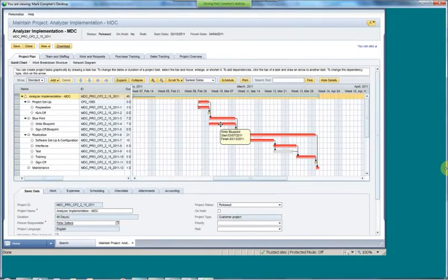It's also telling you some nice things in here. If you look at the little gray bar right above my mouse right there, that's showing me that there is actual time booked against this project for this task. So when I say task, if you go over on the left-hand side, you can see a breakdown of the work structures for this project. It starts up here at a header level, so there's the diamond. That is the header of the project. It's got this chevron for phases, circle for tasks, diamond for milestones within here.